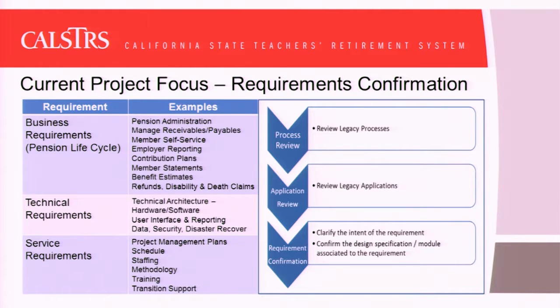And so what we've been doing since the first week of September is going through those 2,100 plus requirements, and we're bringing in SMEs from the organization to validate those requirements, to find out, okay, the RFP was put together and went out 2-3 years ago. Are these still valid requirements? Just confirm they're still accurate, or we're doing some further elaboration, that maybe that requirement really has morphed into additional requirements. So we're capturing that, and that is actually going to be our blueprint now going forward as we start to transition to our design activities. Any questions on that? Okay.